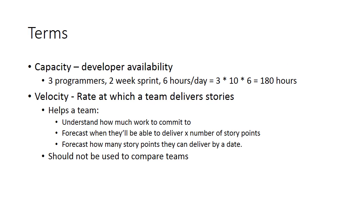Capacity relates to how much time developers have available to do work. If three programmers will have ten workdays in a two-week sprint, and we assume that each works six hours per day, then we have a total of 180 hours of capacity for this sprint.